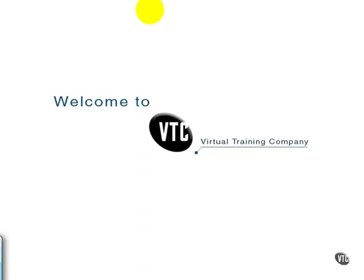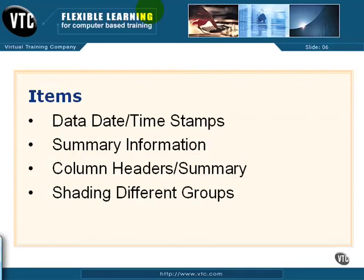In this movie, we're going to cover a few basic design tips for a summary style report. Essentially, we're going to cover a few items that are key when creating almost any type of report, but especially with a summary. One is adding the data date and time stamp. The other is how to organize your summary information. The other is aligning column headers with your summary information and then shading different groups to allow the eye to follow the data a little easier. Beauty is in the eye of the beholder, but these are a few tips that I find useful over the years.